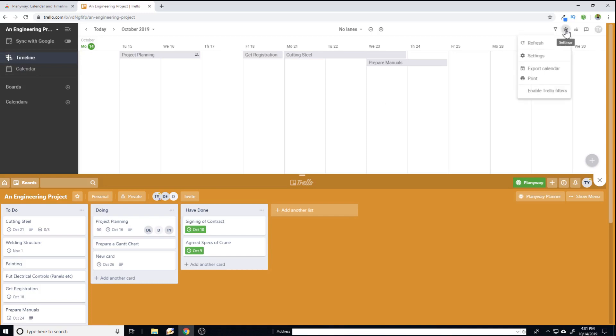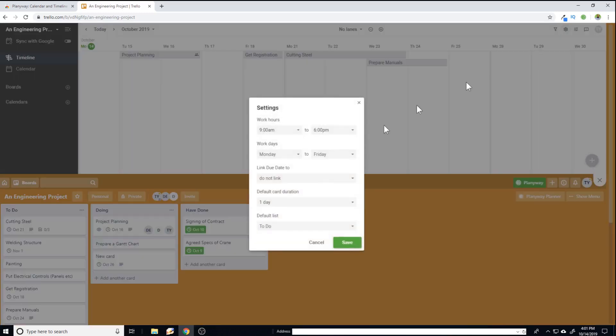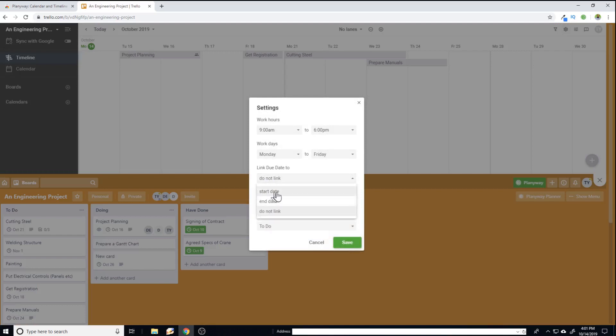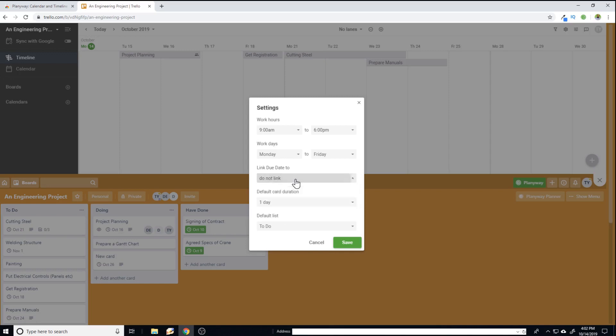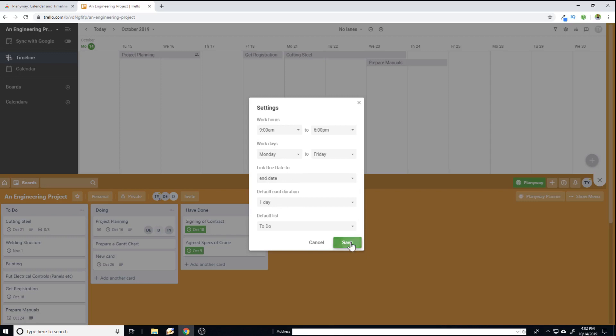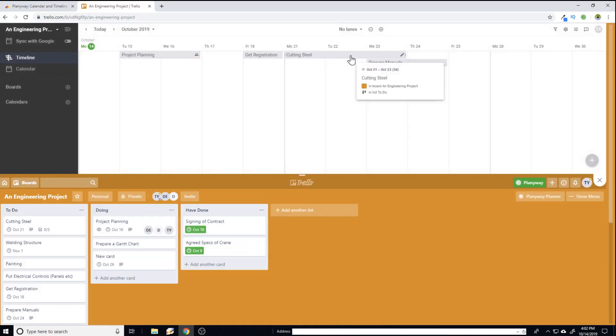If I click on this settings and then settings again, here I have the ability to link due date to either the start date or to the end date, or if I want I do not link to any due date. So let's say I link this to end date. So the due date is the end date of any task and then I can save this.